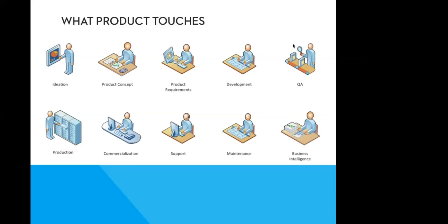Also, you work with QA because you have to write your user stories with test capabilities. What's the acceptance criteria, which will serve as a basis for the test that will be carried out on that product when it's ready to ship? What does your acceptance criteria mean? How do we define that this is done? And how do we define that it's working? And how do we now say this thing has no bugs, let's ship?